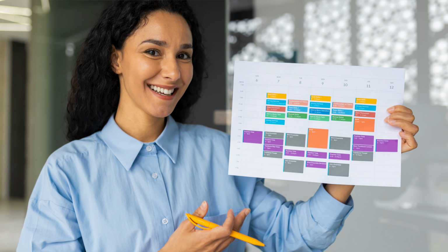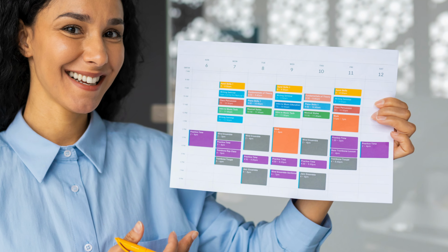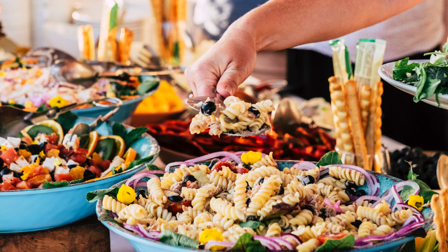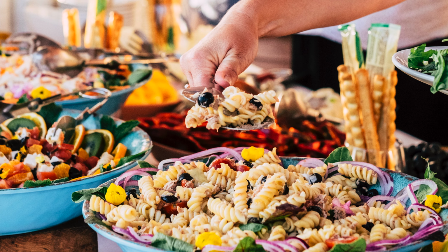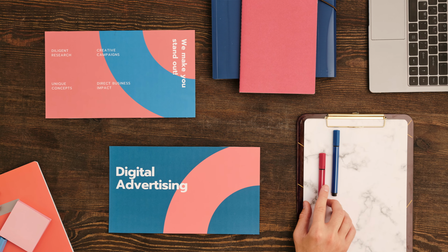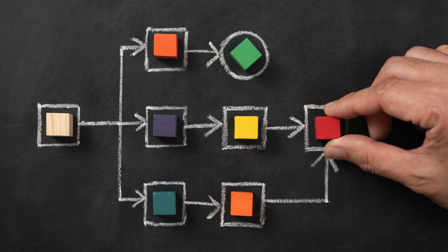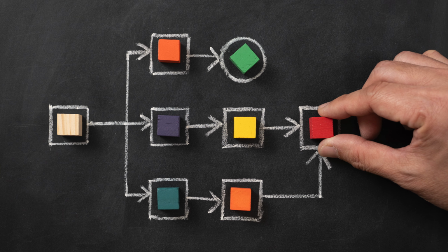Let's imagine you're planning a campus-wide student orientation. Some key dependencies might be that you can't finalize the printed schedule until all the session leads confirm availability. This would be finish to start. Room bookings and catering orders may need to be submitted together. This would be finish to finish. And promo materials and registration setup might need to launch simultaneously. This would be start to start. Mapping these out helps you avoid last-minute scrambles and ensures nothing falls through the cracks.